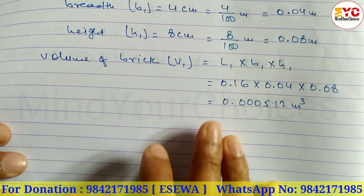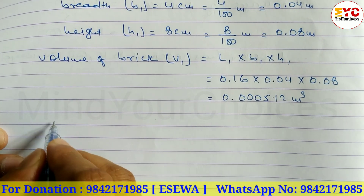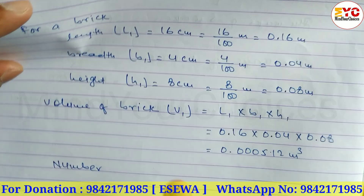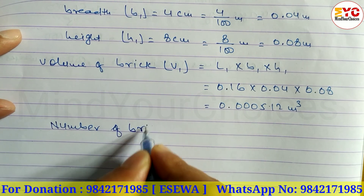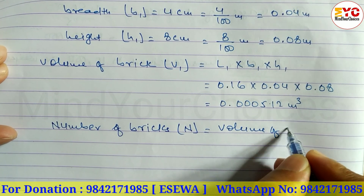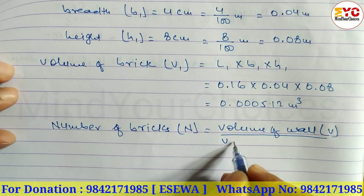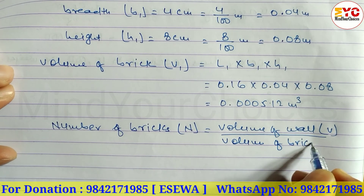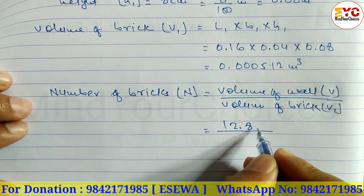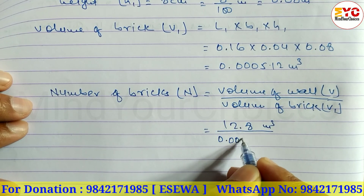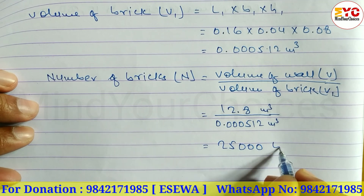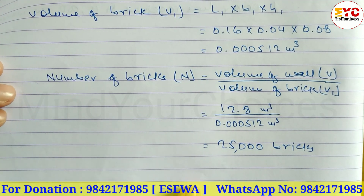Now we have to find the number of bricks. The formula for number of bricks is: N = volume of wall divided by volume of brick. So N = 12.8 divided by 0.000512, which gives us 25,000. Number of bricks is equal to 25,000.